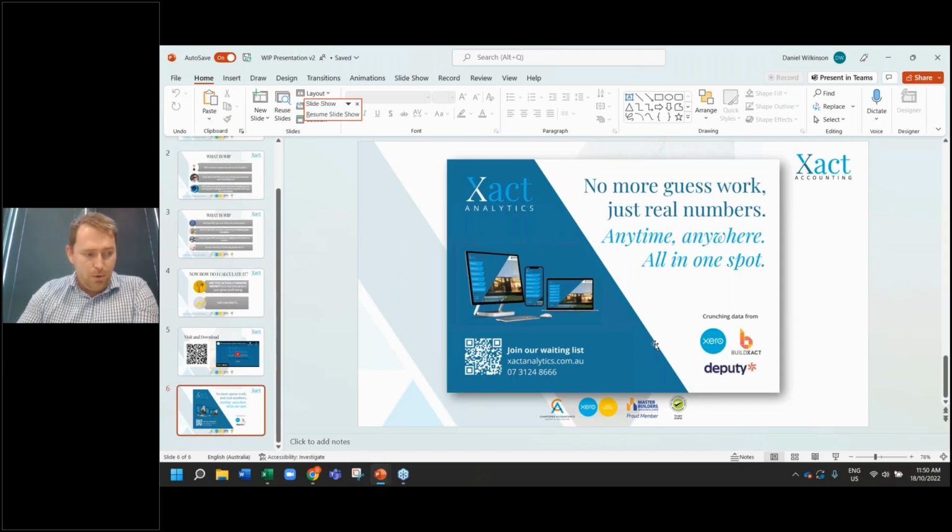Yeah, it's just really important for that job costing, that job profitability, that you do maintain and defend that where you can. And some of the feedback I've had from some builders on this as well is that there might be costs coming through. They can jump in really quickly, see where the business is up to. And there've been quite a few variations missed out of this process too, because you'll see this huge cost come in, but then there might have been some paperwork that might have been missed as well. So variations are a common piece that pop out of this, as far as feedback goes.